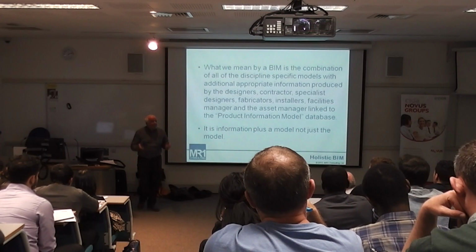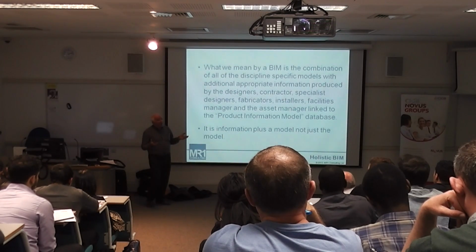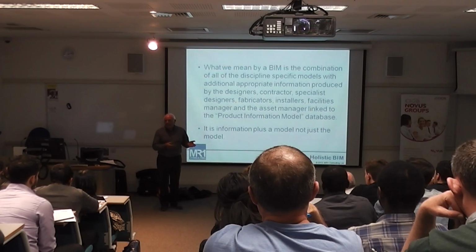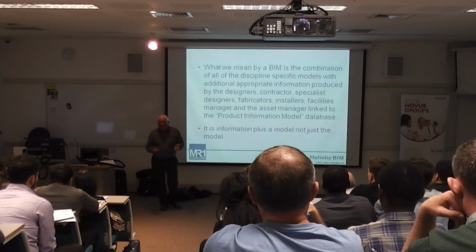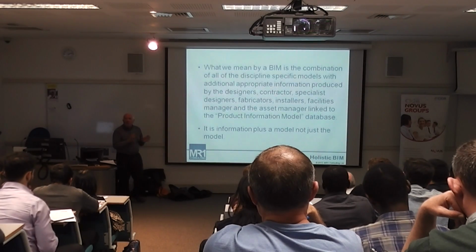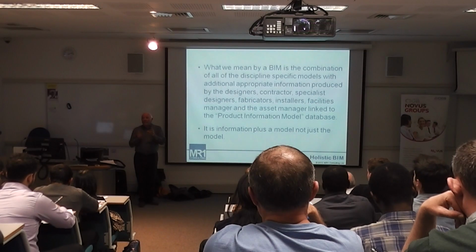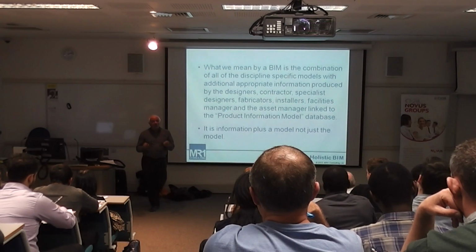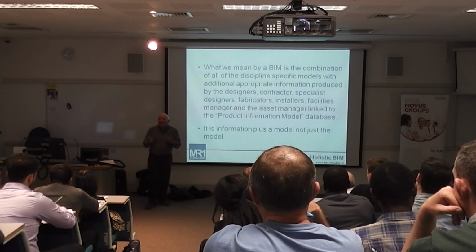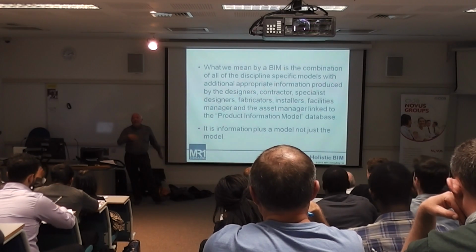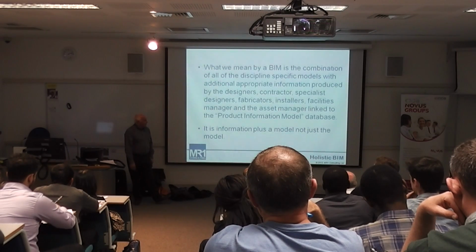95% is a massive amount of additional information about this asset, about this project, how to maintain it, what its performance requirements are. So this is about data procurement now, not just about building procurement. We want the building, but we also want the data associated with it, good quality information, checked and suitable for purpose, delivered at the end of the project. Handover from PIM to AIM, project information model to asset information model.